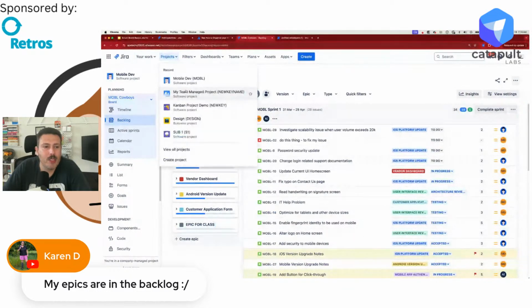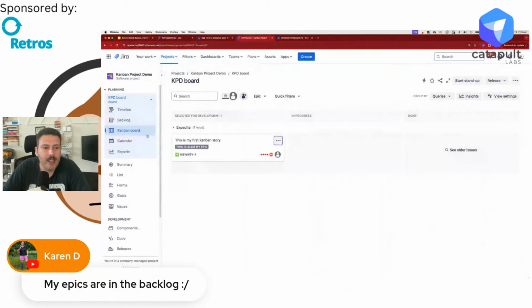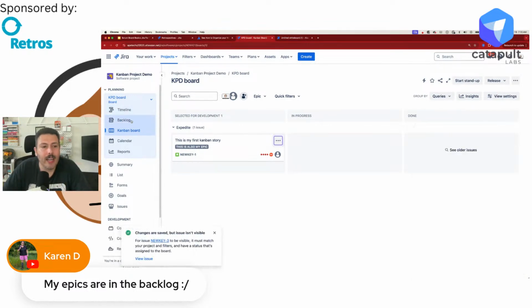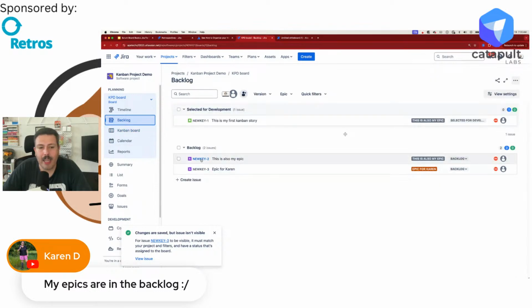And in fact, I can prove it to you. If I go to a Kanban one over here and I create an epic here, epic for Karen. Oops, sorry, Karen, I misspelled your name, right? But if I create an epic and I put it under Karen and I go to my backlog here, you'll see that I do have epics in my backlog, but that's because we are in a Kanban board. So you want to make sure you're picking the right one.